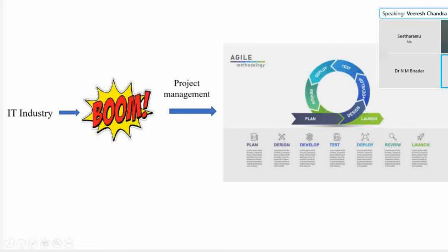Okay, plan, design, develop, test, deploy, review, launch. First bit completed. So immediately after this, the customer will review it. He will say, okay, this is okay, you can go with the second part. Or else, if the feedback is negative, let us say he wants something to be added or something to be deleted, immediately we will consider this one only.